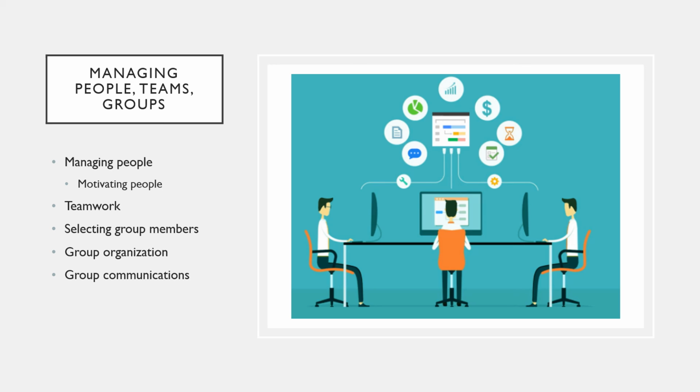The best size for a software engineering group is 4 to 6 members, and they should never have more than 12 members. When groups are small, communication problems are reduced. Everyone knows everyone else, and the whole group can get around a table for a meeting to discuss the project and the software that they're developing.